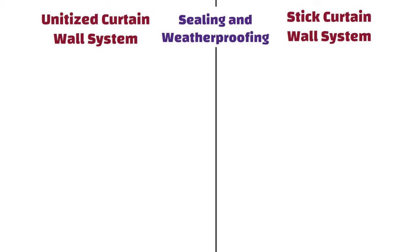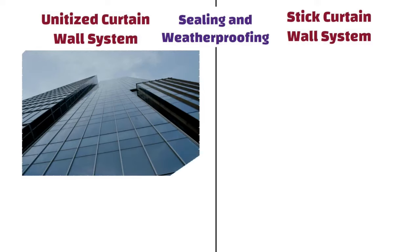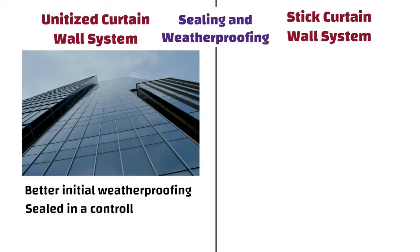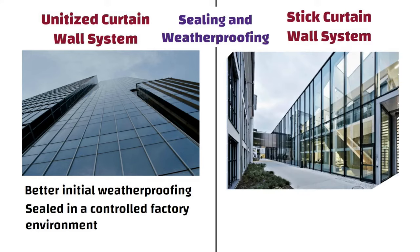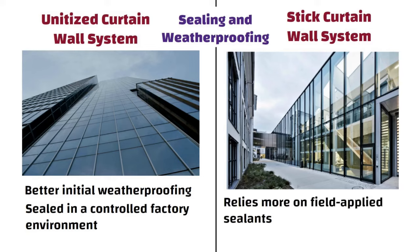Sealing and Weatherproofing: Unitized systems have better initial weatherproofing as units are sealed in a controlled factory environment. Whereas, in the case of stick systems, weatherproofing relies more on field-applied sealants, which may have a higher risk of installation error.